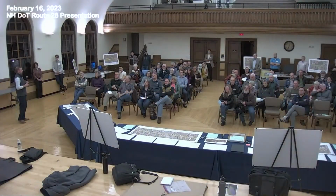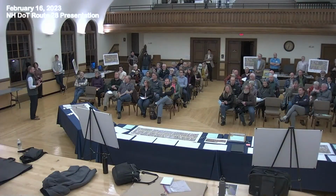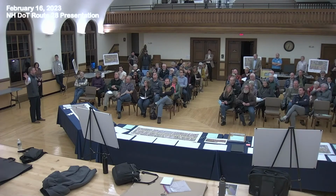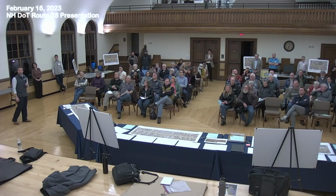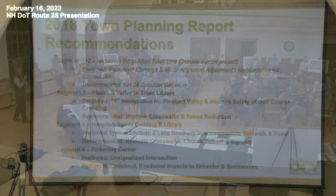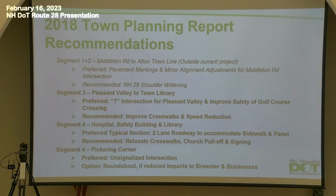If we do have the opportunity to get more money, which did happen a couple years ago, there was a change in the funding formula. There was additional funding out there. I requested an additional $3 million for this project, so now we're at a total funding of $10 million. It still doesn't cover all segments, but we're going to focus on what the town felt was priority. So from here on out, you're really only going to see the town's preference, to make sure that we address segment 3 and segment 4, and that's essentially what we've got here.